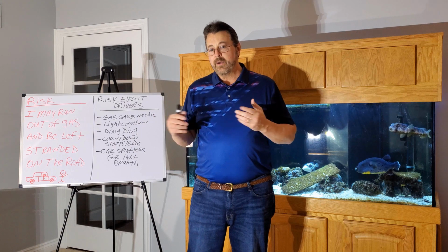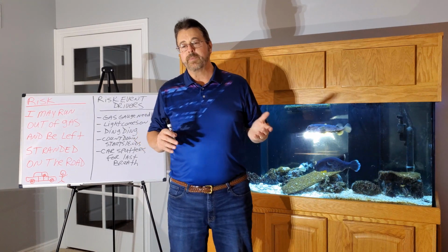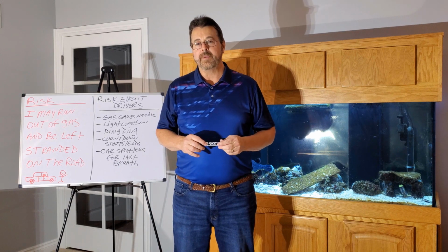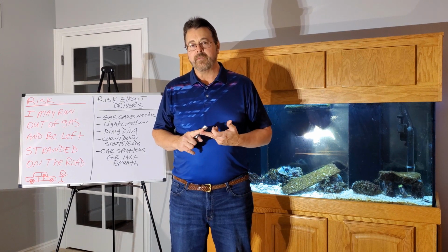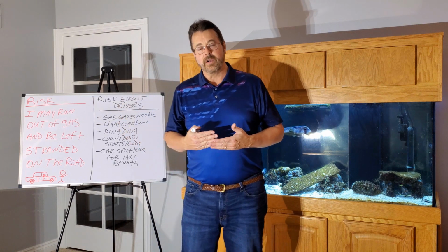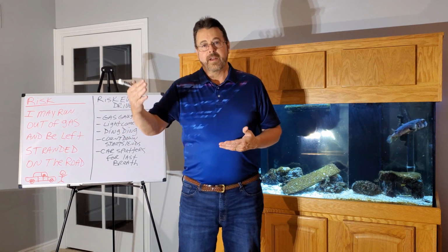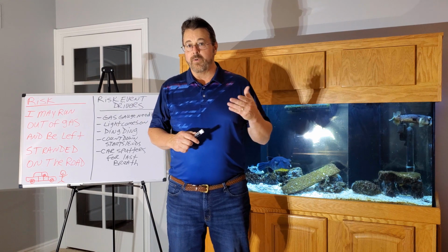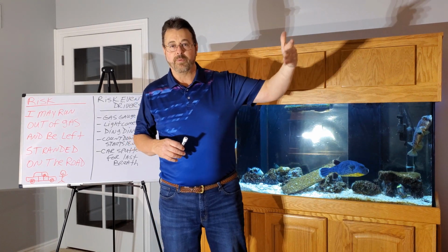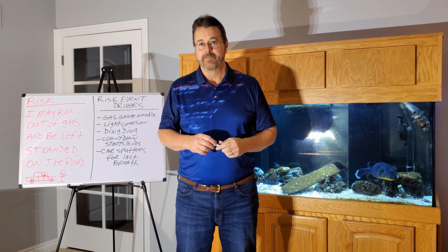So it's not always easy to think about the drivers, and in some cases you might not be able to, but in most cases, if you put a little time into it, you'll come up with a few drivers that you can monitor, and as those risk event drivers occur, then the likelihood of your risk will go from low to medium to high to the point where the risk actually happens.